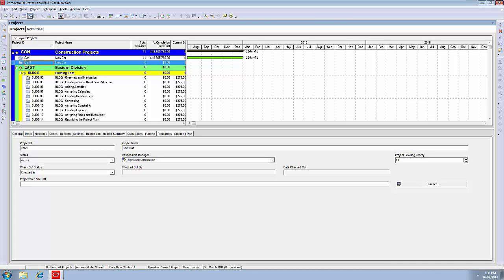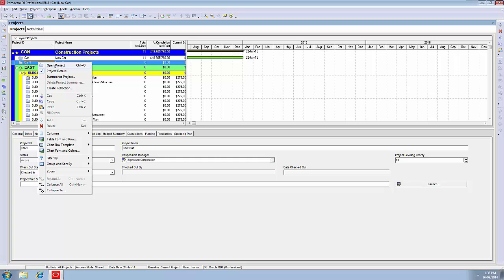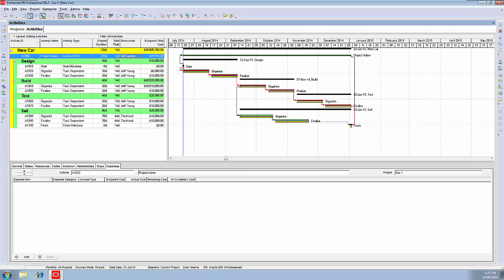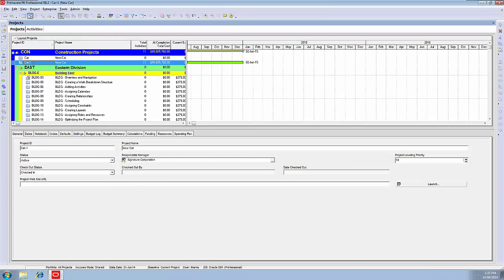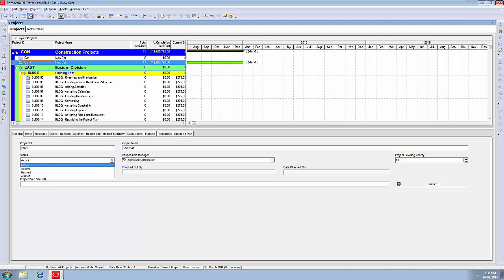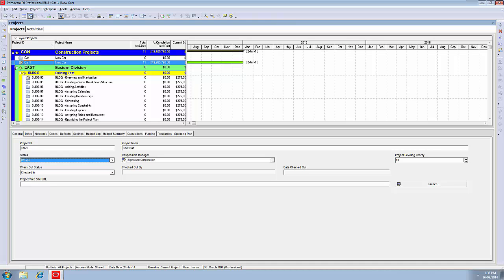There is the copy in the same node, under construction projects. You can see the ID now has a dash one against it. What we should be doing is changing the status of that to what if, so that we don't start double-dipping on our resources. Notice it's greyed out at the moment. The project actually has to be open in order to change the status of the project.